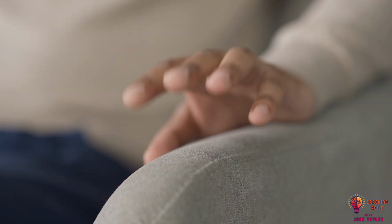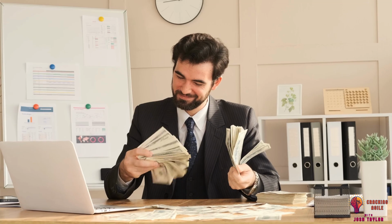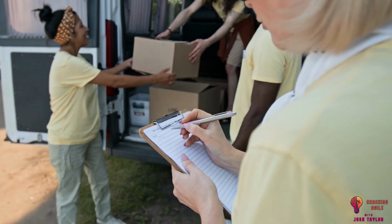A good rule of thumb here is to wait until the very last responsible moment to spend money. Because once you've spent money, then the business is going to expect a return on that investment. Just like you wouldn't purchase a big ticket item a year in advance of when you would actually need it, make responsible decisions about when you're going to bring on resources to your project. And hey, listen, sometimes there's just a delay between when the resource shows up for use and when you're actually going to purchase it. You'll need to figure out when to bring that resource into the project.